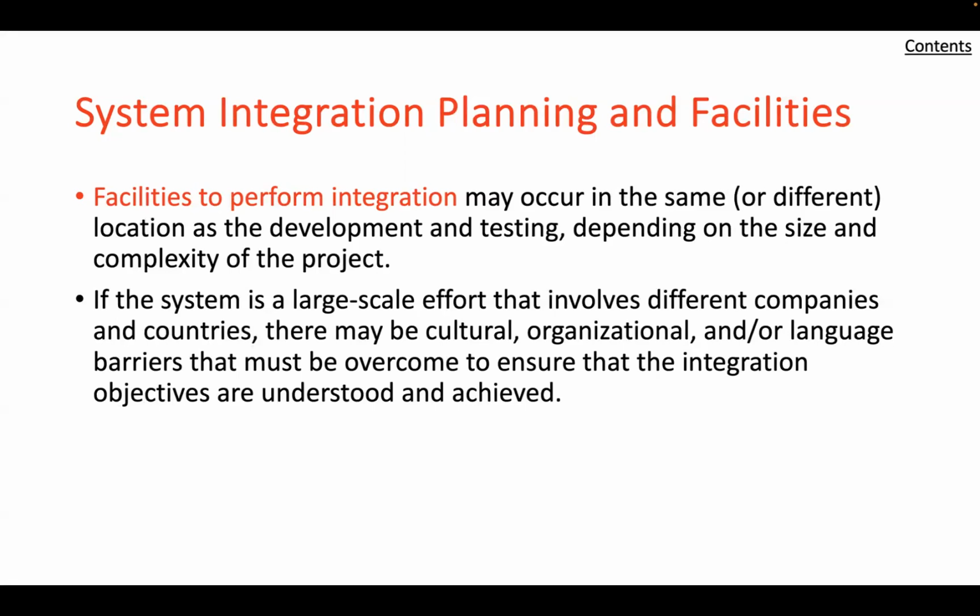In the event that they do not, special test procedures are instituted to reveal the particular design features that need to be corrected. Throughout the entire process, system integration proceeds in an orderly, stepwise manner, with system elements added one or two at a time and then tested to demonstrate proper operation before proceeding to the next step. This procedure maintains control of the process and simplifies diagnosis of discrepancies.